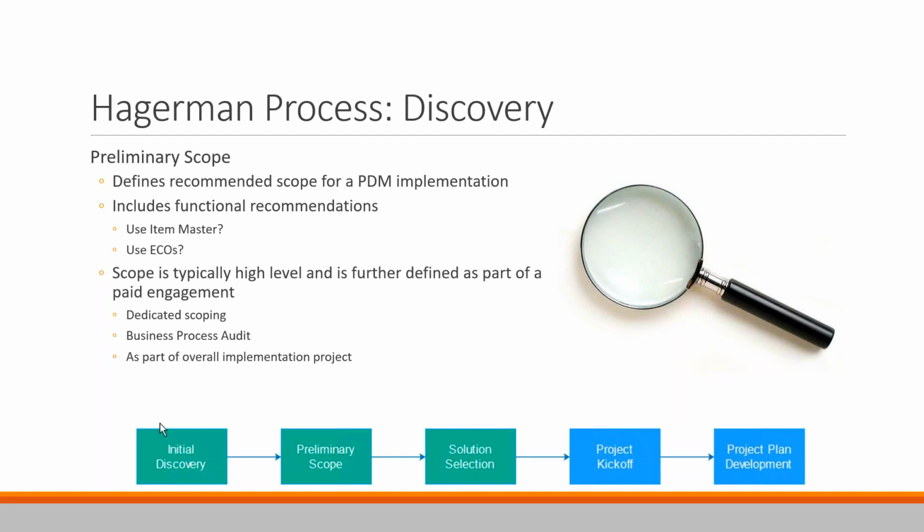What elements can we pare down in this initial phase so that we can still help you get it implemented? And then maybe later on, once the solution is in place and demonstrating value, maybe then there'll be more appetite from the person signing the check to implement additional bits of functionality. So we do our best to be flexible if at all possible, right?